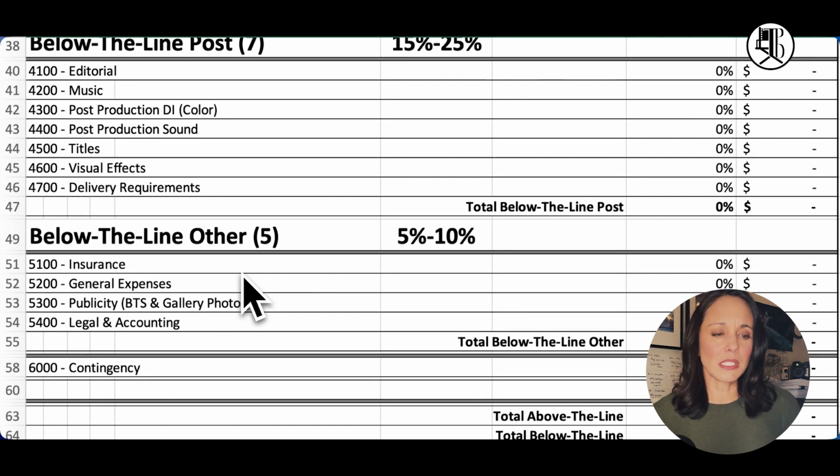For a film these days, just a normal walkie-talkie film, even at $1 million, it costs me upwards now of like $40,000 to $50,000 to insure the production. No joke. So that is a pretty solid estimate. Sometimes you can get short-term insurance. Some of that might be better, but insurance is just expensive, okay? And you must have it.